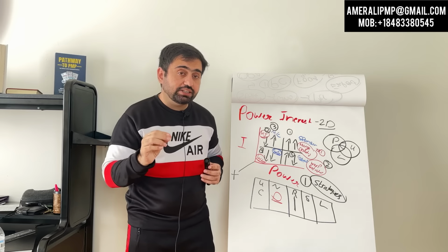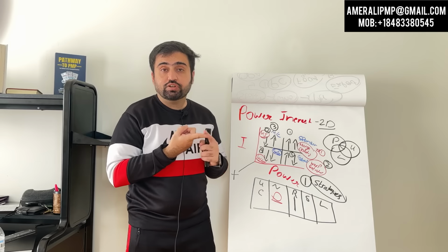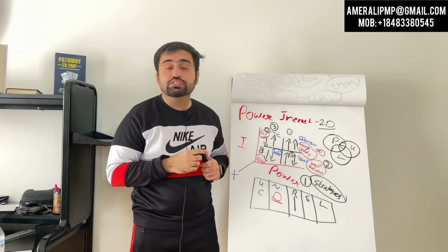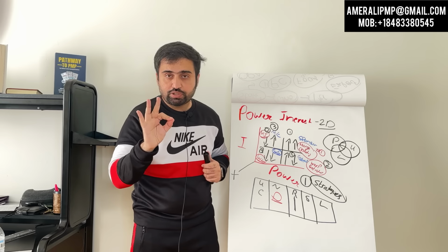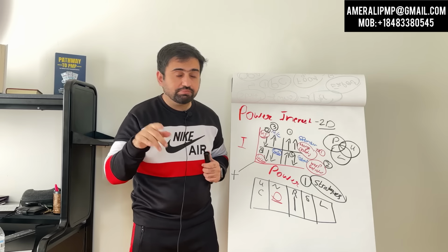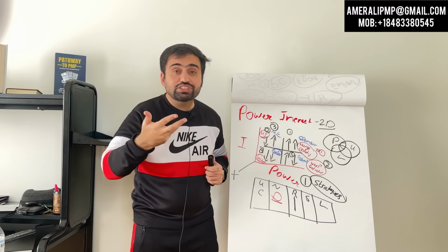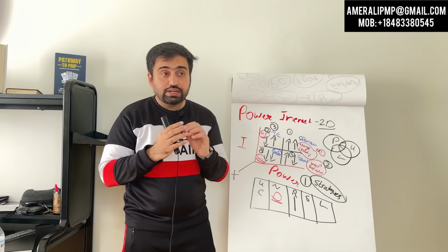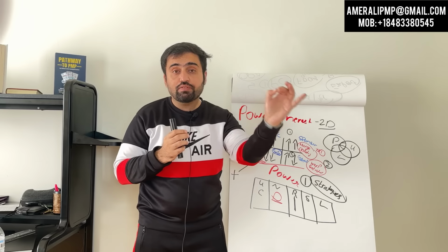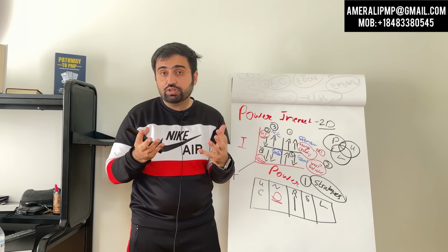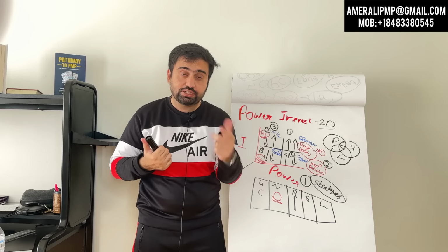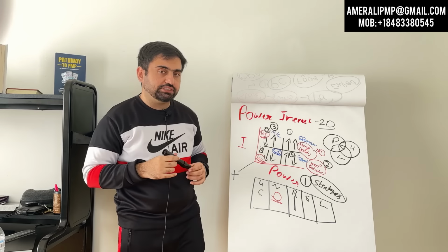Critical thing: whenever a new stakeholder is identified, you put him into the stakeholder register, no change request needed. Prioritize him, no change request needed. But if because of that you now have to update the stakeholder engagement plan, now you need to raise a change request. I hope that makes sense to you.